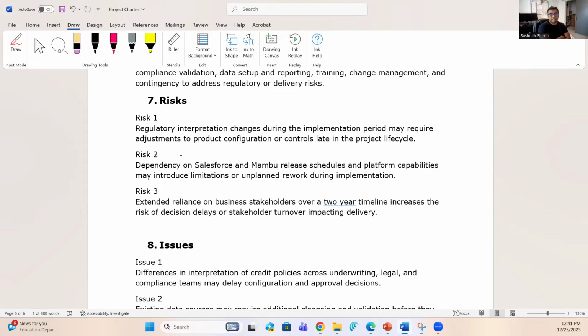So, intelligent bank stakeholders cannot go and directly control government policies. And what will get passed tomorrow? We don't know. So, that is a risk, right? Because it's a 2 year project. So suddenly they pass a regulation saying the interest rate should not be less than a certain number or more than a certain number. We might need to make changes.